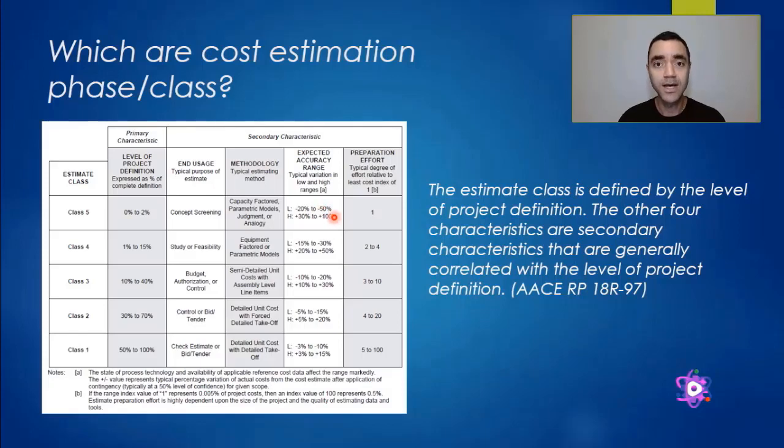If we are talking about one project whose cost estimate results in 100 currency, in the end the amount of money expended can be 50 currency or can be 200 currency, because this is the range of the cost estimation. The cost estimation engineer will define the level of accuracy for each cost estimation based